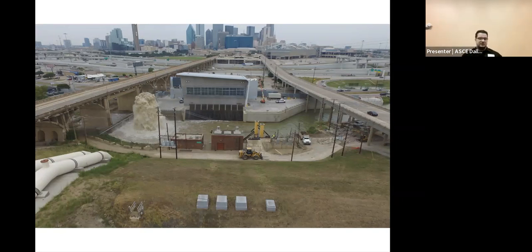So with doing this testing, they tested, I think this is 9 and 10 pumps. Once these were online and testing, when everything went through, you were then able to decommission the original two, Small and Large Able. And then after that, you go through and put the remainder of the piping through.